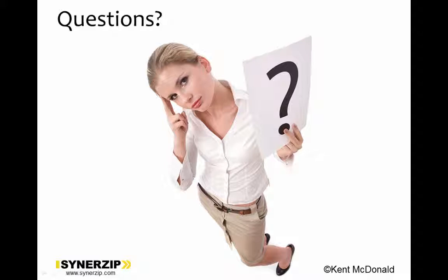So what we did is we used that as a definite constraint that says we know we've got to have something available, and it was basically by backing up. Here's when the conference is. Here's when we usually like to have the program identified. Here's how long the process takes to pick the sessions. So we need to have something that's going to accept sessions by December 1st. And we were starting in mid-October. So we knew that we had from mid-October to December 1st to get something done.